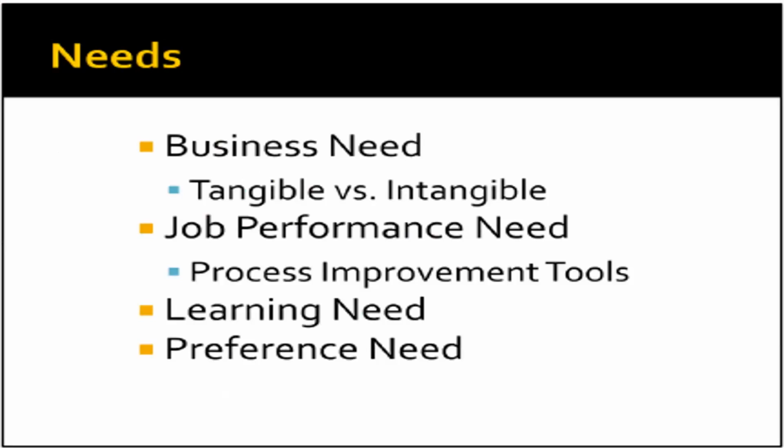Lastly, you always need to make sure that you understand the preference needs. Preference needs are those things that guide how the project is to be conducted. These would be things such as the budget, team members, time available to complete the project, deliverables, and so forth. Often, the preference needs are set by the project sponsors and its stakeholders. It is important that preference needs are understood by the entire project team at the beginning of the project in order to ensure the project stays on track.